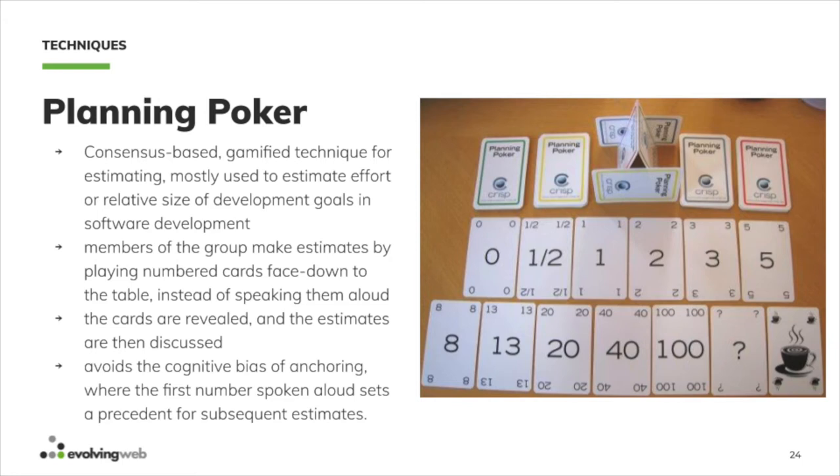I think a lesson out of there is that it's good not to estimate in hours, because it's not realistic that it's hours. It won't be. So at least this is more honest, that it's the relative complexity of this task versus another task, and then you can say, well, we'll take 3 big tasks and 10 small tasks. That's a more realistic approach than saying, according to this, it's going to add up to 24 hours, so why don't we tell the client it's going to take 24 hours? My devs do this to me all the time. And I'm like, to me, it seems like a 200-hour project, guys, so let's not do that. So when you have points rather than hours, it's a little bit more honest that way.